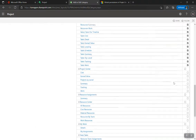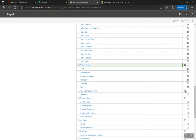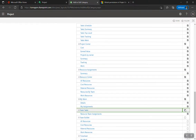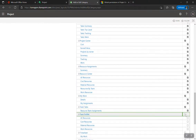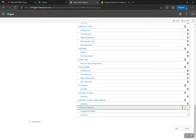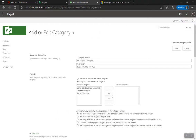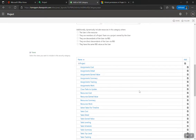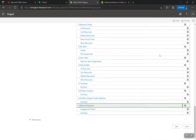I always select all views — this applies to everything in all views. However, you might want to restrict certain views. For example, you could say they can't do anything in the Project Center but could do more in the Resource Center if they're a resource manager. So these permissions apply to these projects, resources, and tasks — but only in the views you've checked. If you don't check any views, this category is null and void.